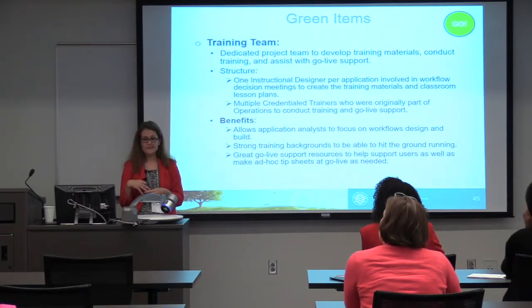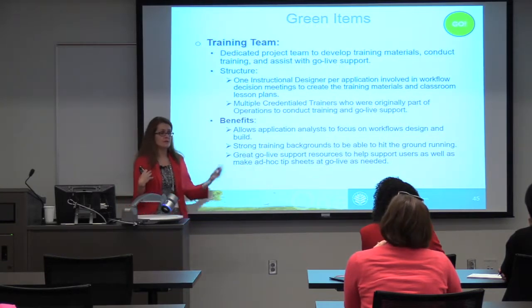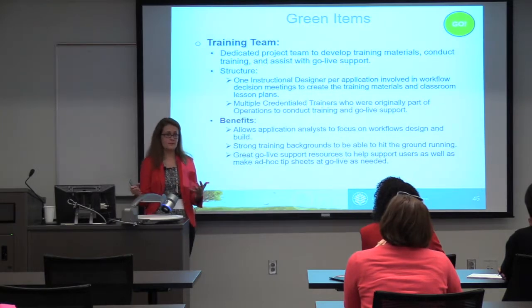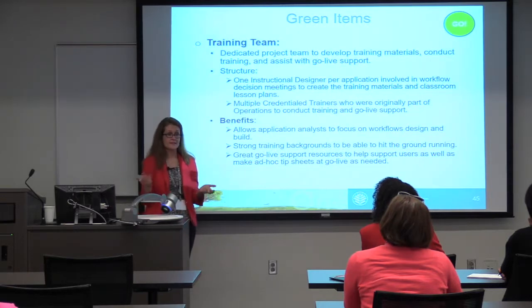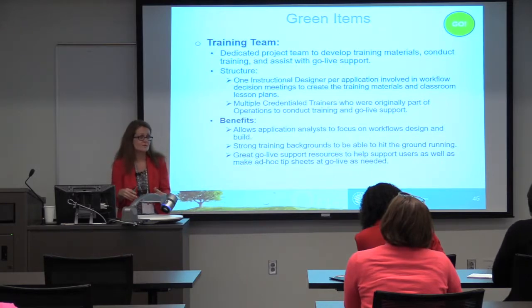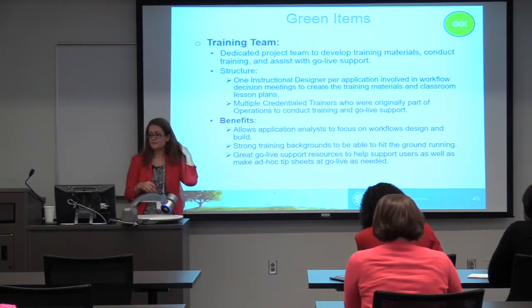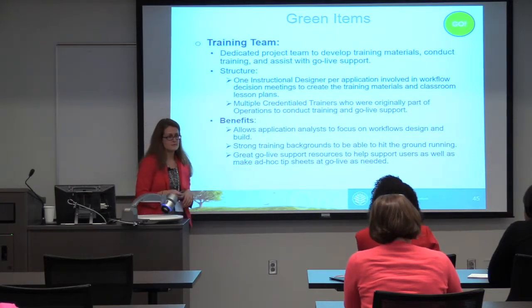And then, quite honestly, these trainers know the workflows better than some of our analysts. So for Go Lives, they're instrumental to our success because, number one, they can be on the floor and answer any questions that pop up. And then, hey, we just found out we need to completely rework this. Josh, can you go build a job aid and get that out to our users? Right then they're able to do it as quickly as possible, and our analysts can be over here actually doing the changes to the workflow in the system. So I just feel like our training team was one of the major reasons why we've been so successful thus far.